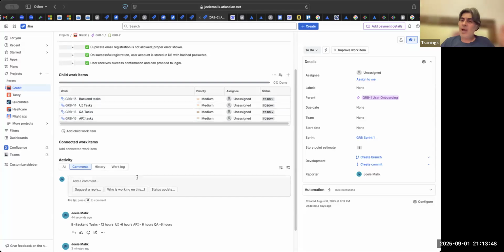And ultimately you can map your story points to hours. Based on hours, you can find out how many story points each story is. And you can do this for 4, 6, 8 sprints. Then people get used to it. And then you can drop the hours. People will immediately know, oh, this is a 5 pointer. Oh, this is a 3 pointer. Oh, this is a 13 pointer. After a while, people will get used to it. Then you can drop the hours. So that way you can transform waterfall teams into agile teams and drop the hours. But if the organization is still insistent, they want to see how many hours, these are your hours.